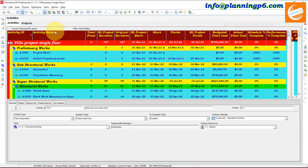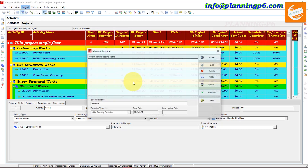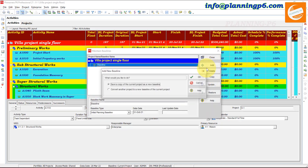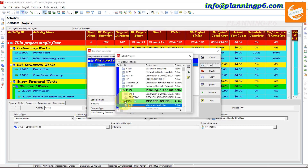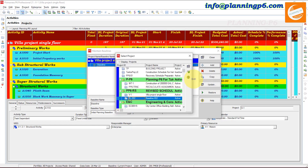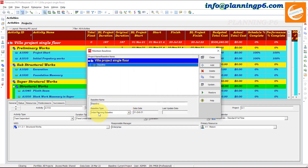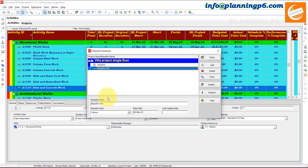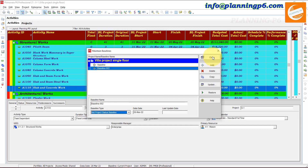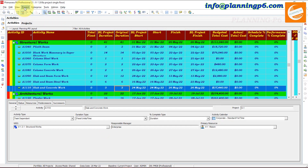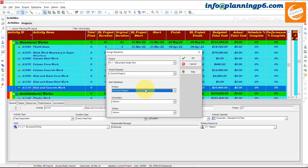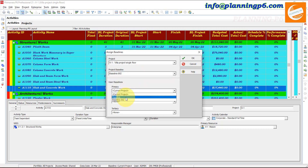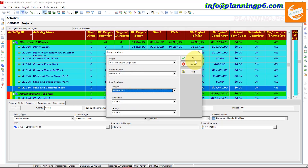Go to the project, then Maintain Baseline. Add another baseline — convert to other. This is the baseline. Add this baseline and name it — this is the Mid Project Baseline. Close it. After closing, assign the baseline: Baseline 2 for both project and primary.